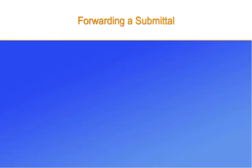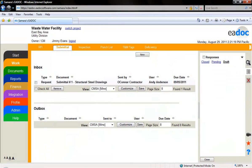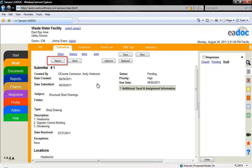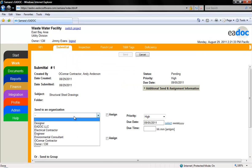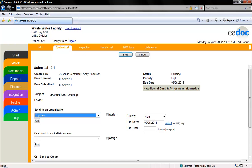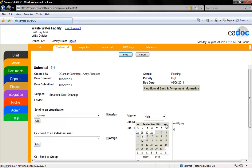In this segment we will cover how to forward a submittal that you have received onto another organization. To forward the submittal, select it from either your inbox or your browse box. You will notice that there is a return button to return it to the sender if necessary. Click the send button. A new window will open up allowing you to select which user or organization the submittal should be sent to. You can make the submittal pending on the recipient by checking the assign box. You can also select a due date and priority for the user or organization you are assigning the submittal to.